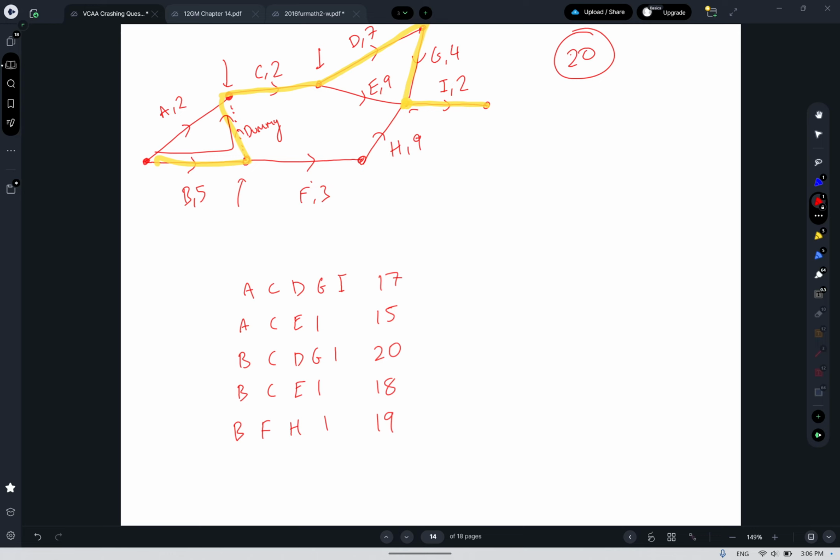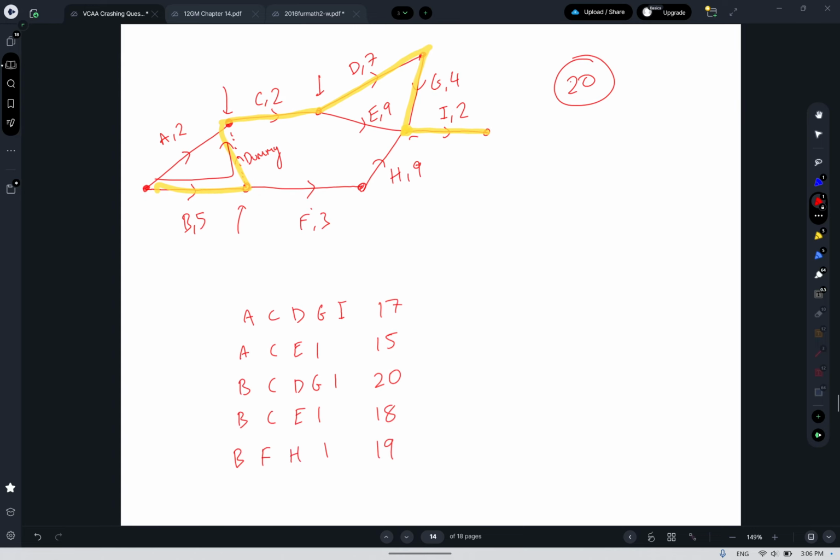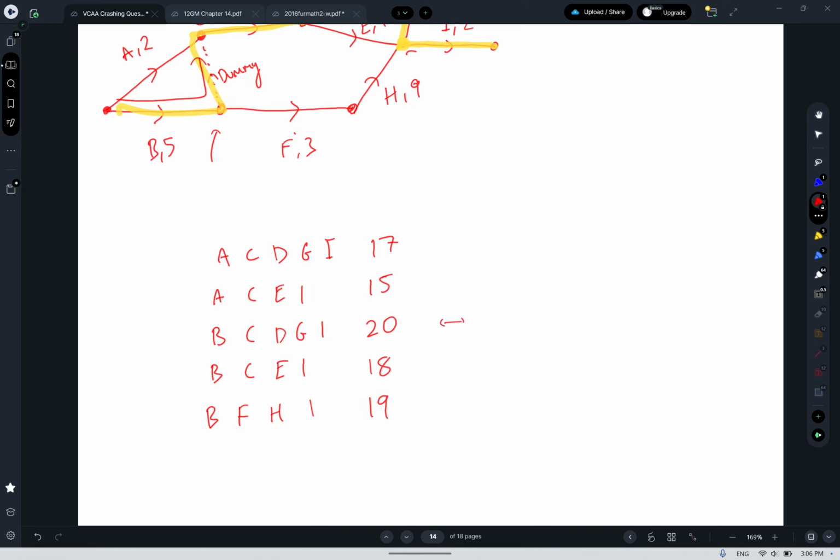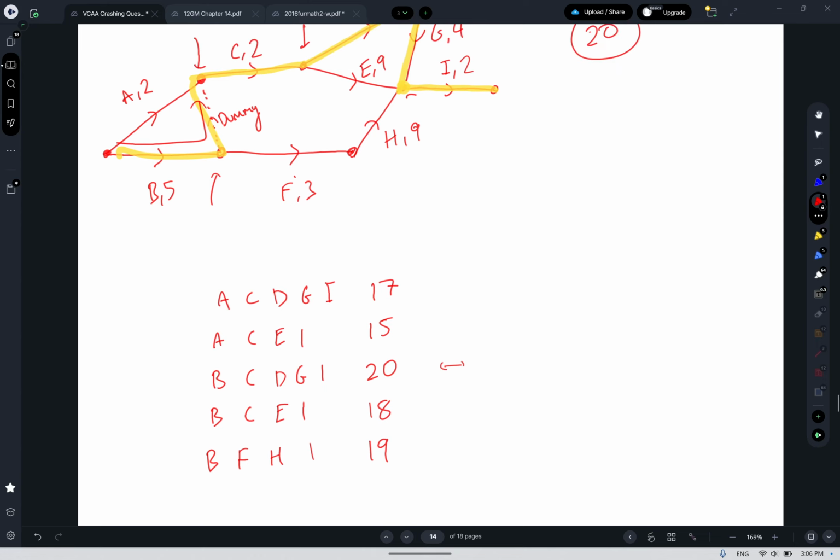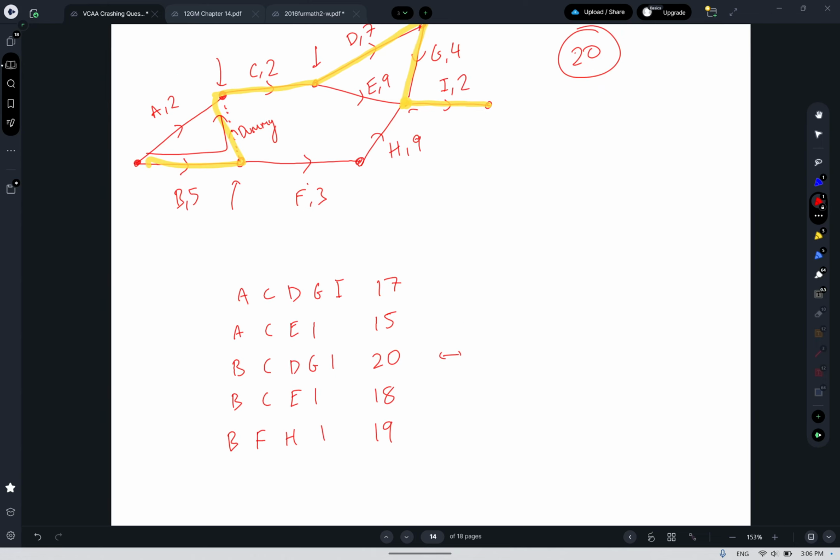Okay, so I can reduce the length of one activity. It has to be one of the critical activities, so it's going to be B or C or D or G or I. I can reduce I by only 1, so it doesn't seem very good. So let's maybe write down our options. So B, C, D, G, I. We can only reduce I by 1, so not very cool.